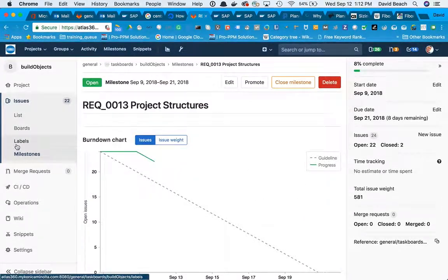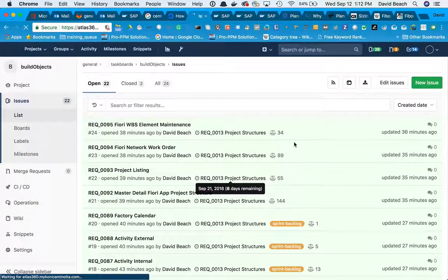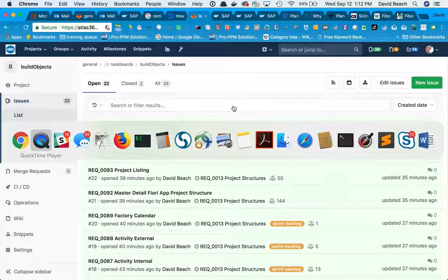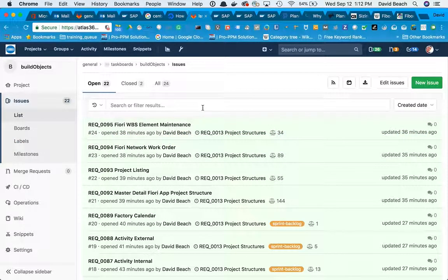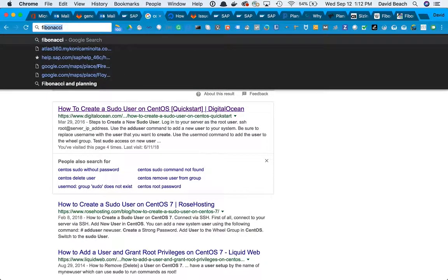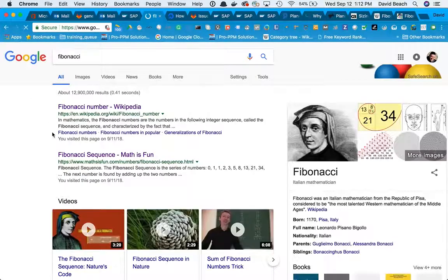Now, one of the things I have done is if we look at the list of the items here, I do assess based off what's called the Fibonacci sequence. I know you can get a listing of what the numbers are, but these numbers are weighting, so you can actually see these are different, like the 34. So the highest possible value is 144. Actually, if you just go online here and go to the Fibonacci sequence, you can get a copy of what they actually are.